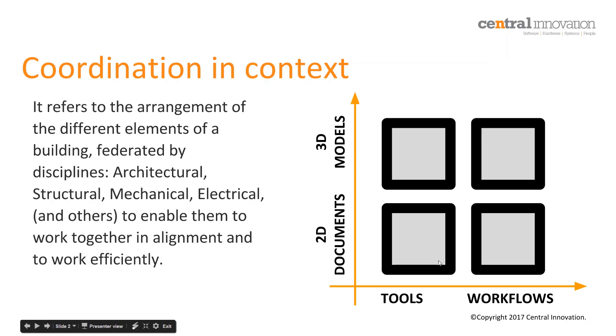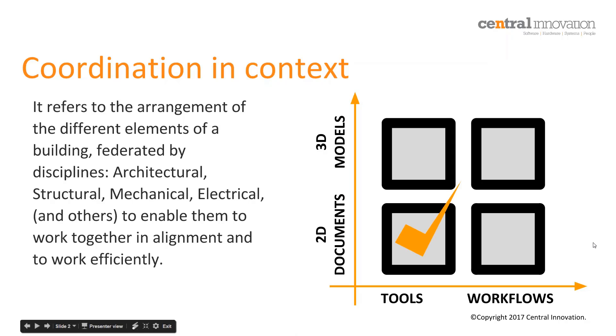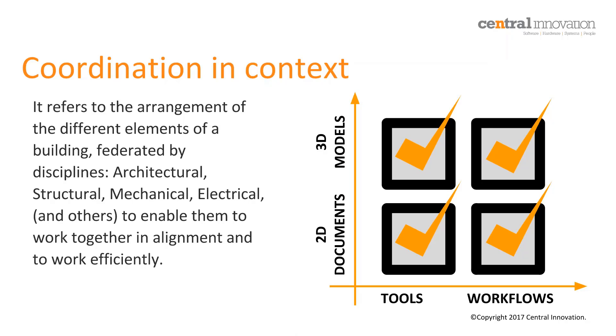That is coordination beyond clash detection of building services. Typically speaking, project coordination is the responsibility of the project lead, usually the architects or a project manager. His role is to ensure that all the other designs - structural, mechanical and so on - are following and aligned in sync with the architectural design intention. That needs to be done both within the context of your working models and also the 2D documents, and that needs to be done across both tools and the appropriate workflows.